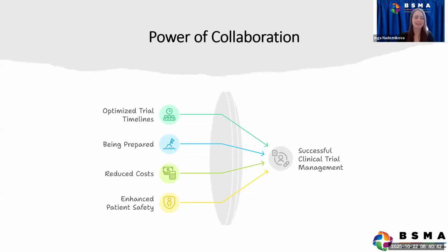Inga? Yeah, just to add, it's definitely a journey. When I joined the team, we created a kind of comparator optimization team, which is a large project team where we all got together from different departments, including regulatory, clinical operations, site operations, supply chain and the setup lead. So really have everyone involved. And we designed this process that I mentioned earlier, the digital tool that we have in place. And we said, if this assessment is not completed, we will not purchase. So that was a line that we put: no assessment, no procurement.